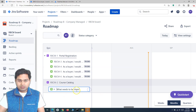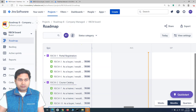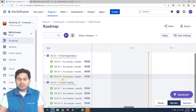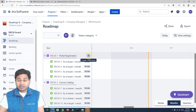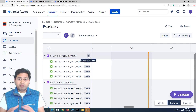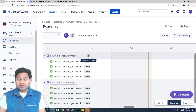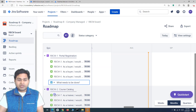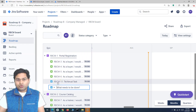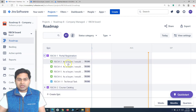For the Course Catalog, click the plus icon and add the stories there. A team doing this work will have epics, stories below them, and tasks as well. For example, under Portal Registration there may be a technical task — not a specific business requirement, but needed to fulfill one. You can create a task below the epic, label it as a technical task, and keep adding issues below these epics.